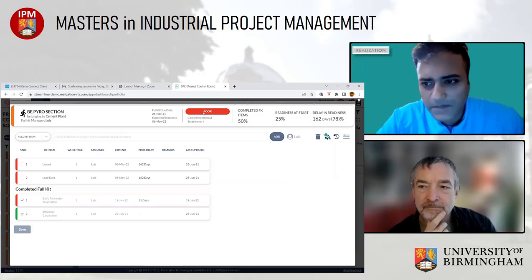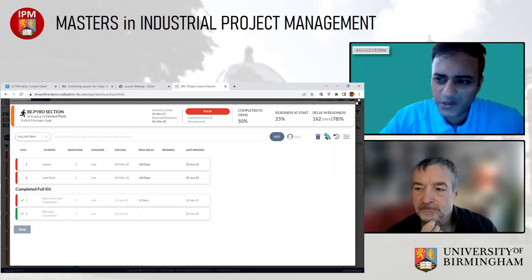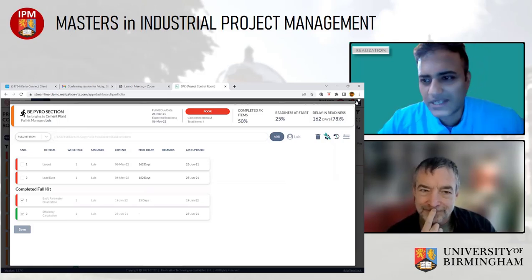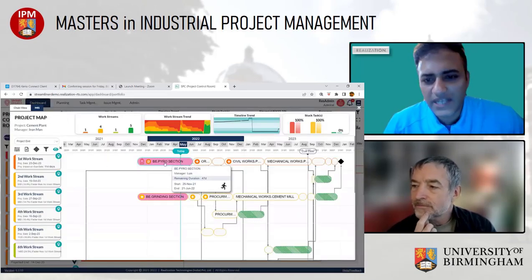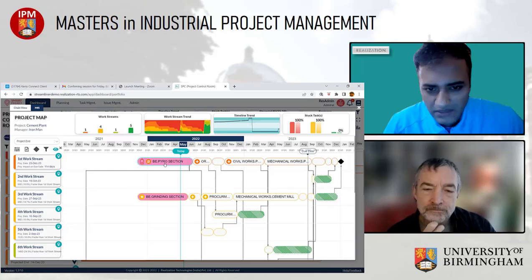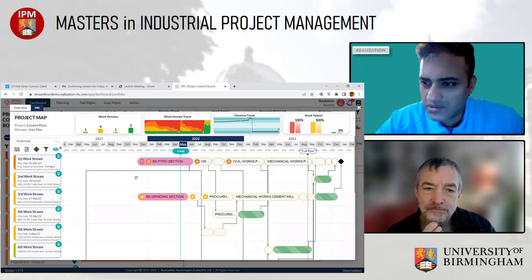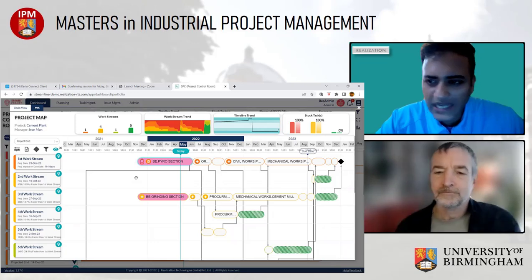Okay, yeah. And then there's a third layer. Even after capturing your known dependencies in the network, even after doing good full kitting, you can still face some problems while you're executing. You cannot remove the possibility of that happening. So in that case, the user can raise runtime issues immediately. In this example, there are no such icons visible, and I will show you when I get to the user part. They can raise runtime issues saying that I have faced this problem.